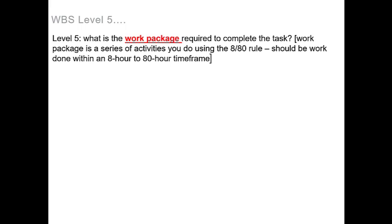So now that we've reached the fifth and final level, what you'll be asking yourself is what is the work package required to complete the task. If you don't already know, a work package is a series of activities you do using the 80/80 rule, which states that the work should be done within an 8 hour to 80 hour time frame.